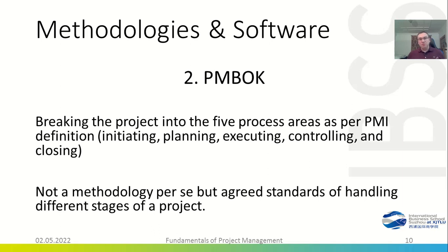Now, Project Management Body of Knowledge, PMI's book, is not a methodology per se, but a collection of standards that project managers all around the world agree upon of this is how we are handling different stages of a project. And essentially what it does, it breaks the project down into 5 process areas: initiating, planning, executing, controlling, and closing. For every single step of this workflow, there is different items that we need to focus on, that we need to complete in order to close the stage and move on to the next one.